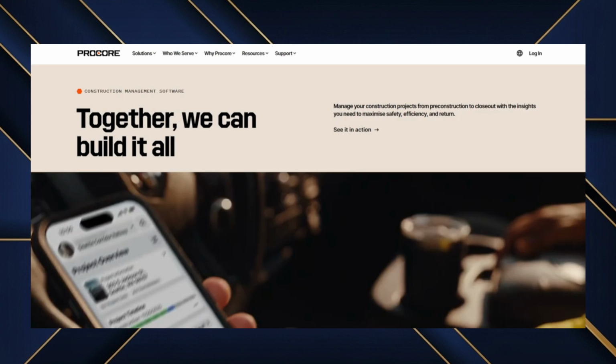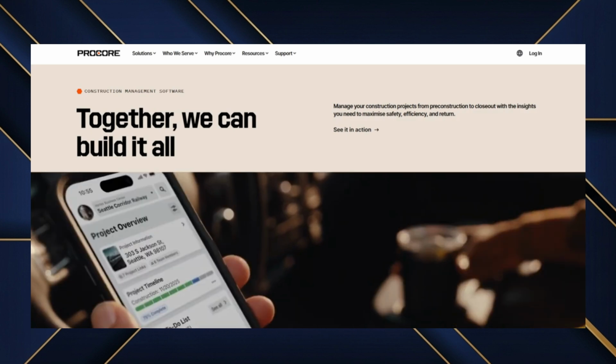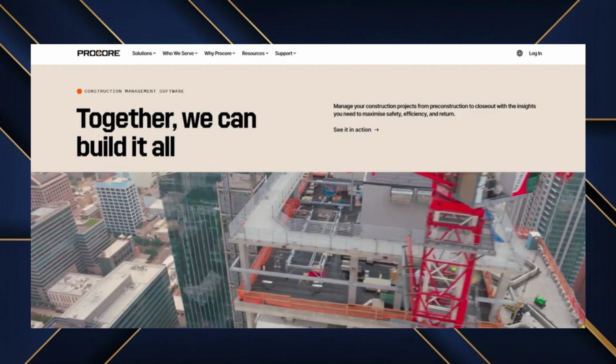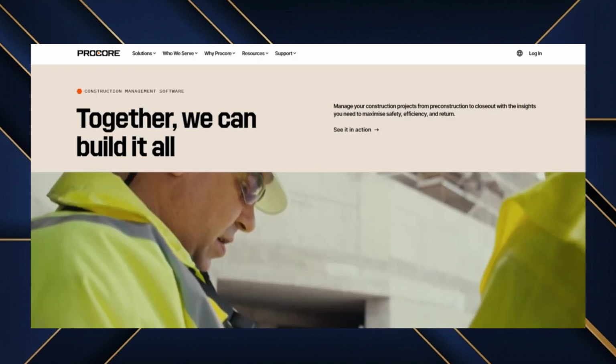After logging into your Procore account and opening your project dashboard, you can access the Submittals tool to create a new submittal by entering key details like title, type, specification section, and assigning it to the responsible subcontractor or team member, which helps set clear accountability.